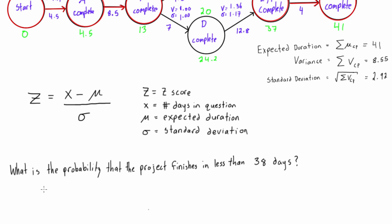All we do is calculate our z-score. Let's fill in our equation. We have z will be equal to x, this is the number of days in question. So that will be 38 in this case, 38 minus mu, which is our expected duration. So that's 38 minus 41, over our project standard deviation, which was 2.92. If you just punch that in your calculator, you get a z-score that is negative 1.03.